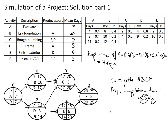However, this is based only on expected times. In reality, activity A can take between four and eleven days, so the project could easily exceed 25 days — for example, if activity A takes 11 days. This is where we need simulation.